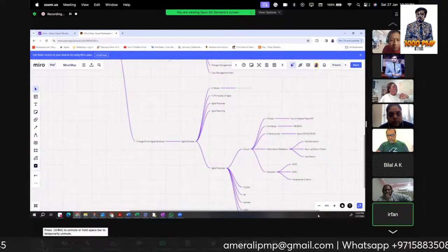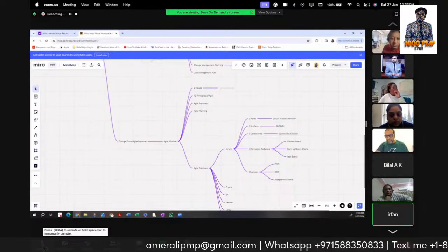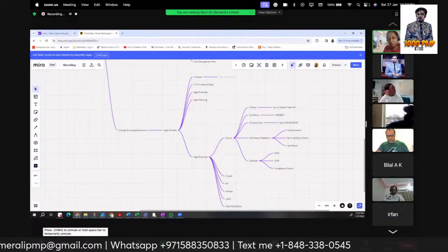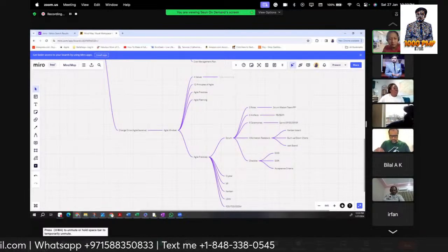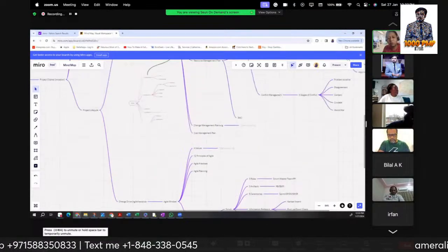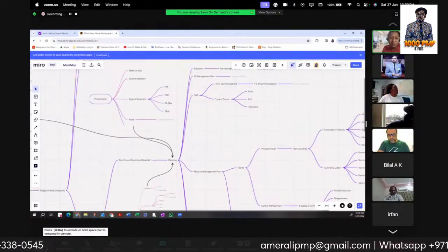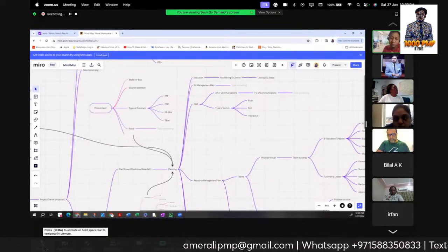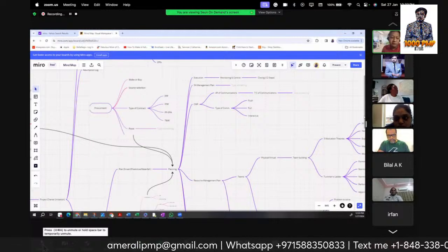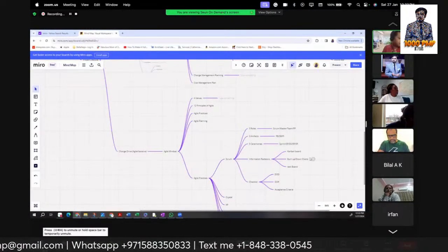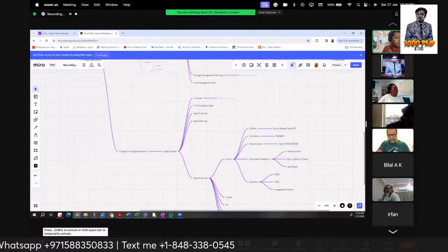Yes, please. Yes. So when you talk about projects, there are fundamentally two ways you execute them. One is plan-driven, where your timeline and cost are fixed and you focus majorly on the quality. And when you go to the change-driven, you're majorly focusing on the value, and time is fixed actually. That way generally it will play. So in change-driven, you have three types of project life cycle. One is iterative, incremental, and then agile.